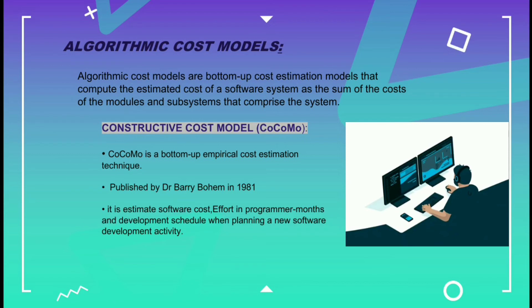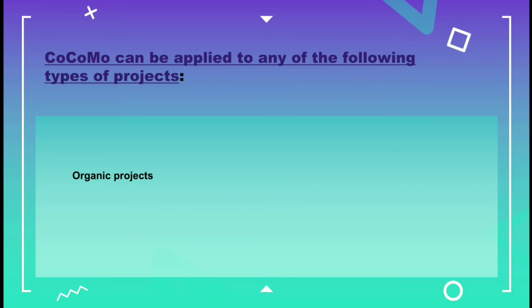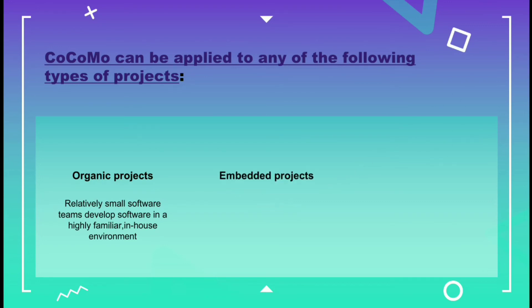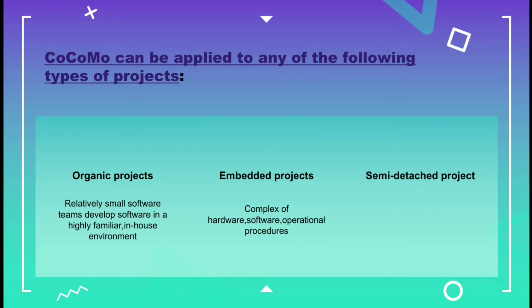The Constructive Cost Model, COCOMO, is a bottom-up empirical cost estimation technique published by Dr. Barry Boehm in 1981. It estimates software cost effort in programmer-months and development schedule when planning a new software development activity. COCOMO can be applied to organic projects, embedded projects, and semi-detached projects — which represent an intermediate stage between organic and embedded.